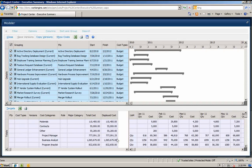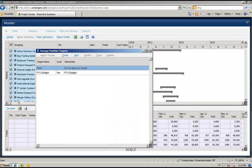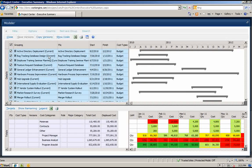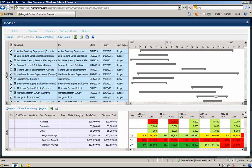In the bottom section of the grid, you will see the cost categories and the cost by months. Another powerful feature of the modeler is the ability to create targets. There are many reasons to use targets. We could set a target that showed the outcome of hiring another DBA to determine if that would resolve potential overallocations in our portfolio. Or, as you can see in this example, we can create a target that reflects our current budget to see how our proposed and active projects perform against the FY11 budget.